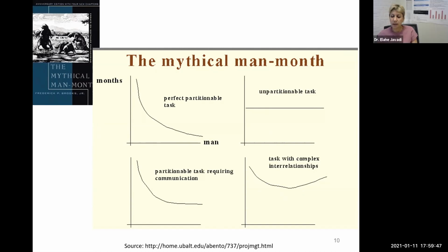Exactly. So this is another case of when adding people would be a mistake, because the task is complex, and the pieces are interrelated. Yes, you gain some by dividing and assigning to different people. After some point, it's counterproductive. So it's going to hurt you adding new people.